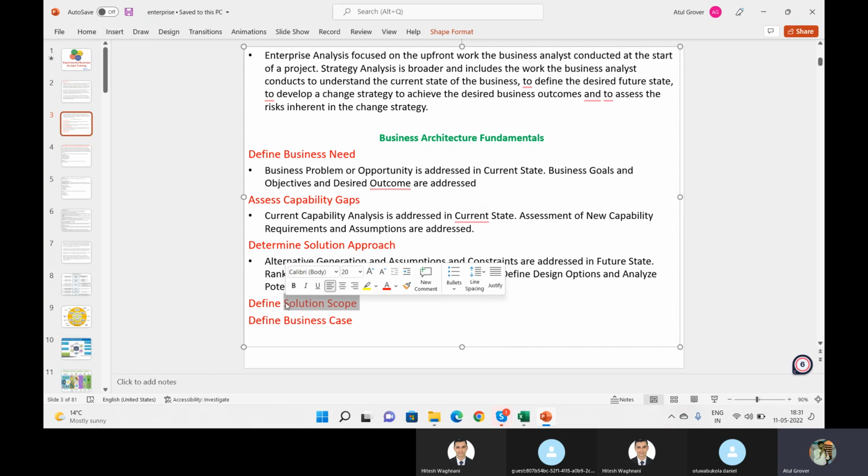Let's define that. You will get 2 bathrooms, 2 bedrooms, fully furnished, kitchen fully furnished, complete western sides, 1 gallery, 1 open gym for you with 2 or 3 crore. That is the solution scope you have to define. Until you define it, the customer will kick you out at the end of the day. Why? Because he will expect a lot of things.